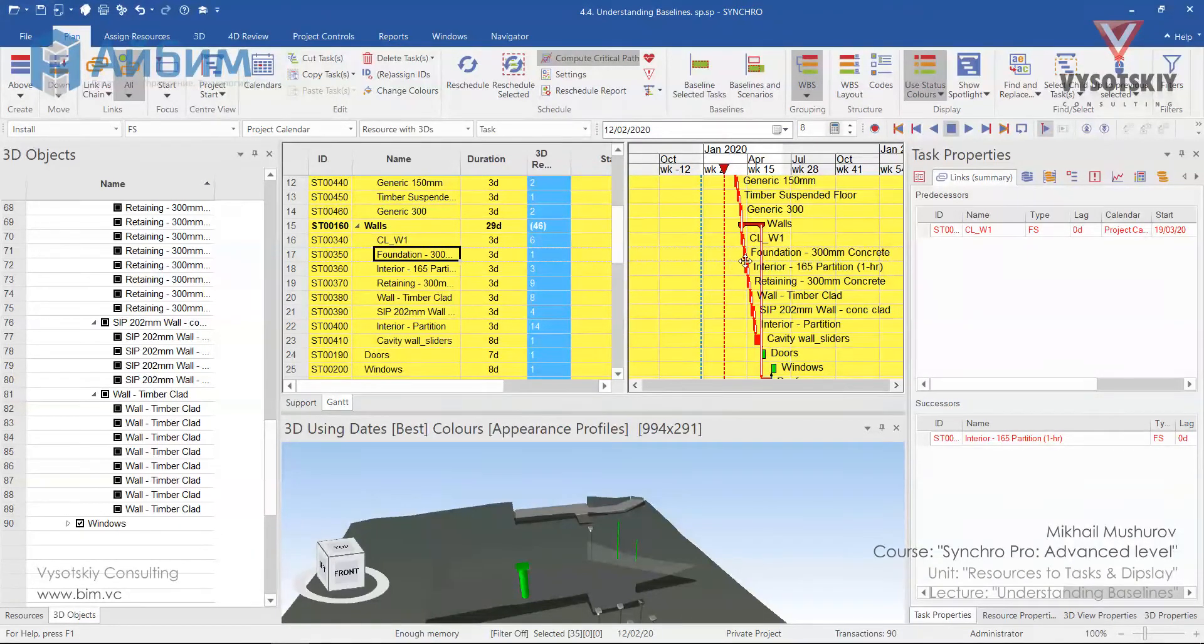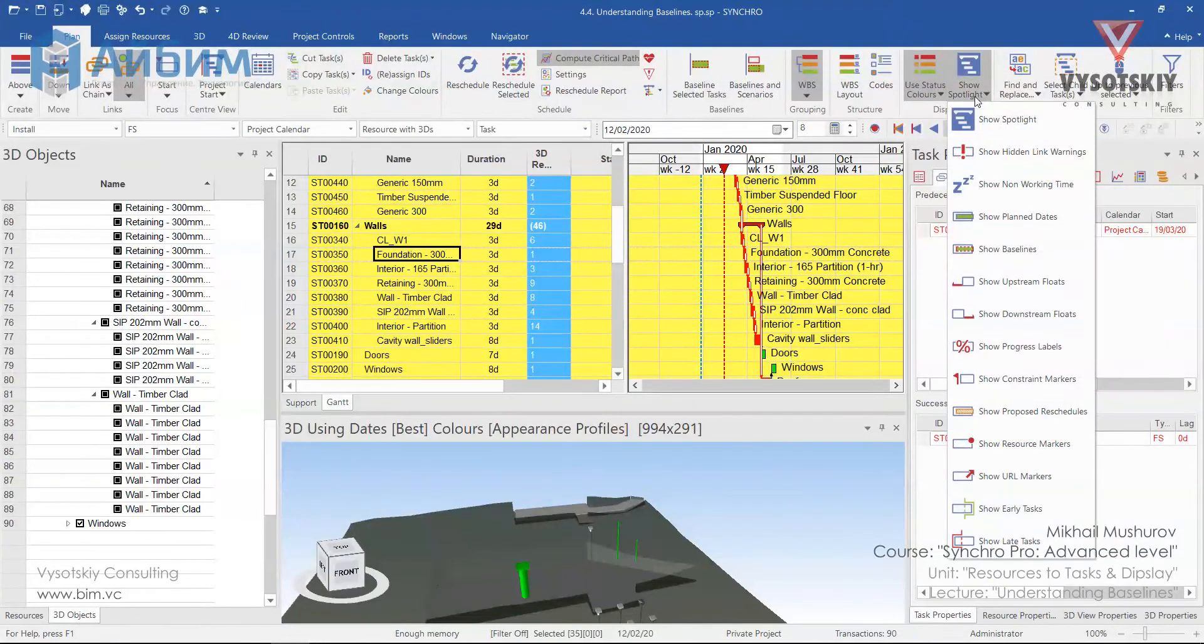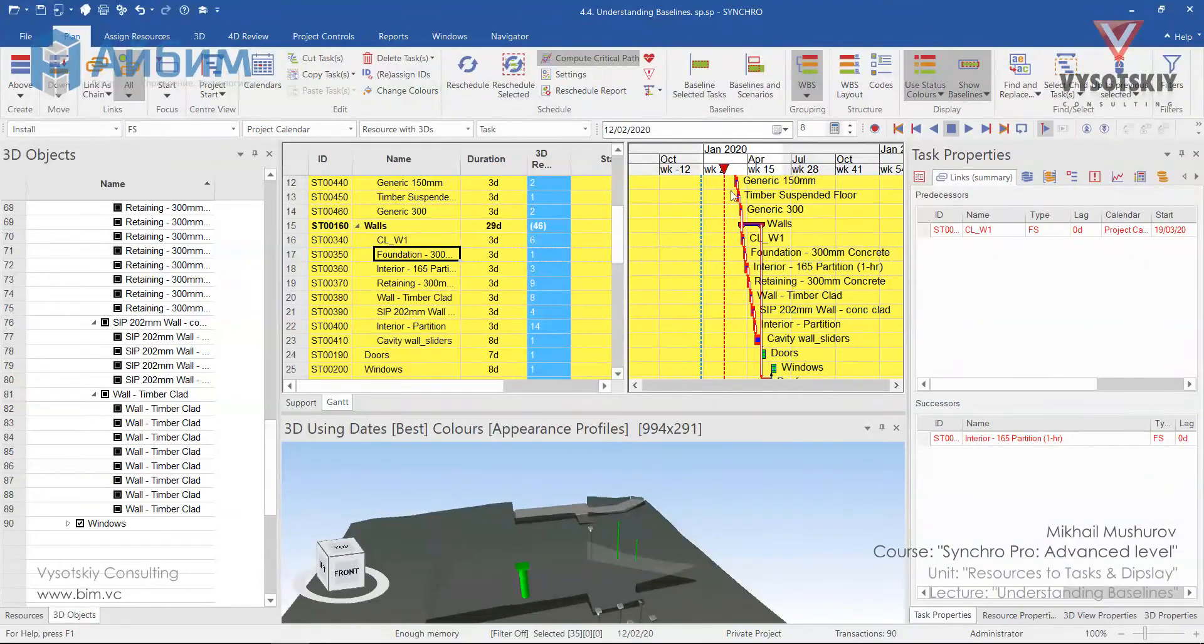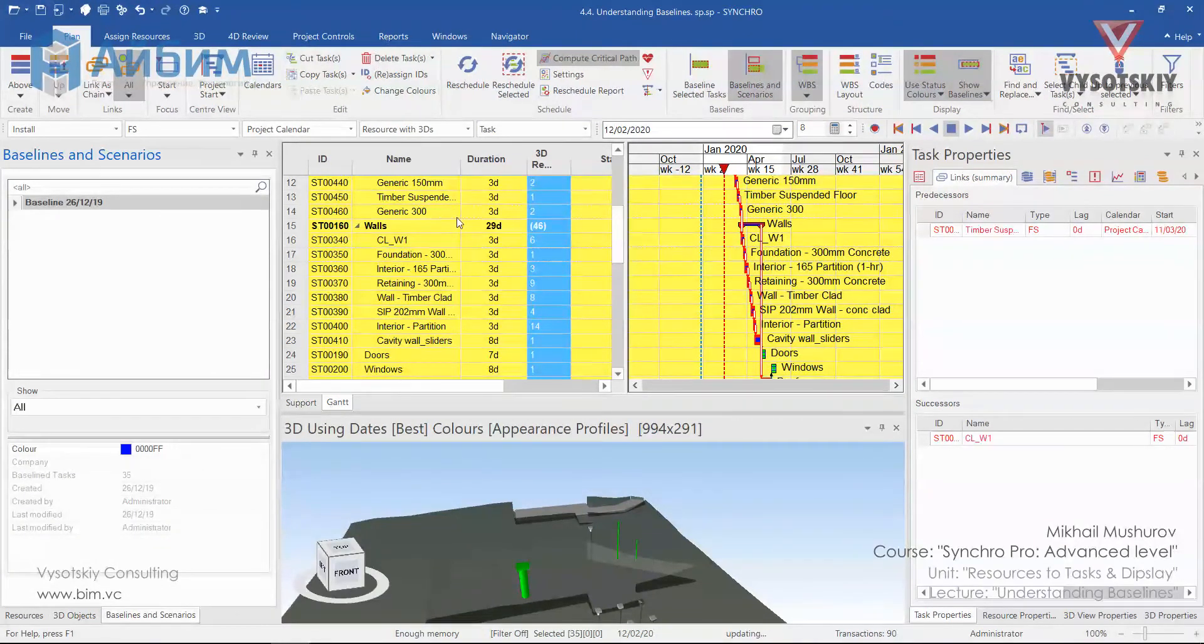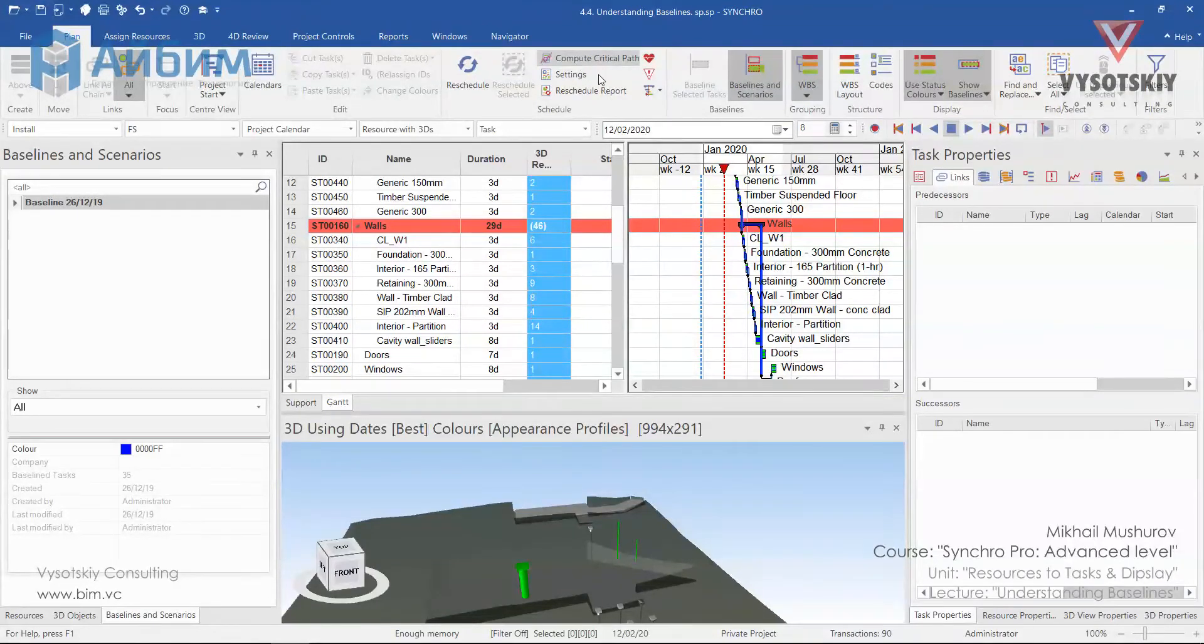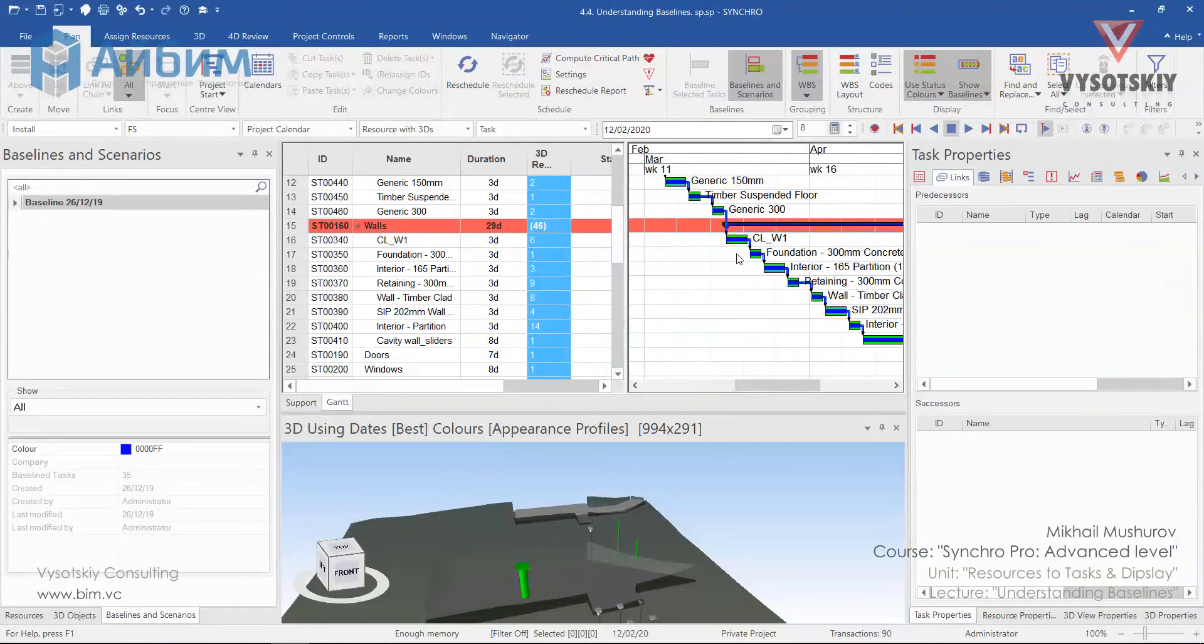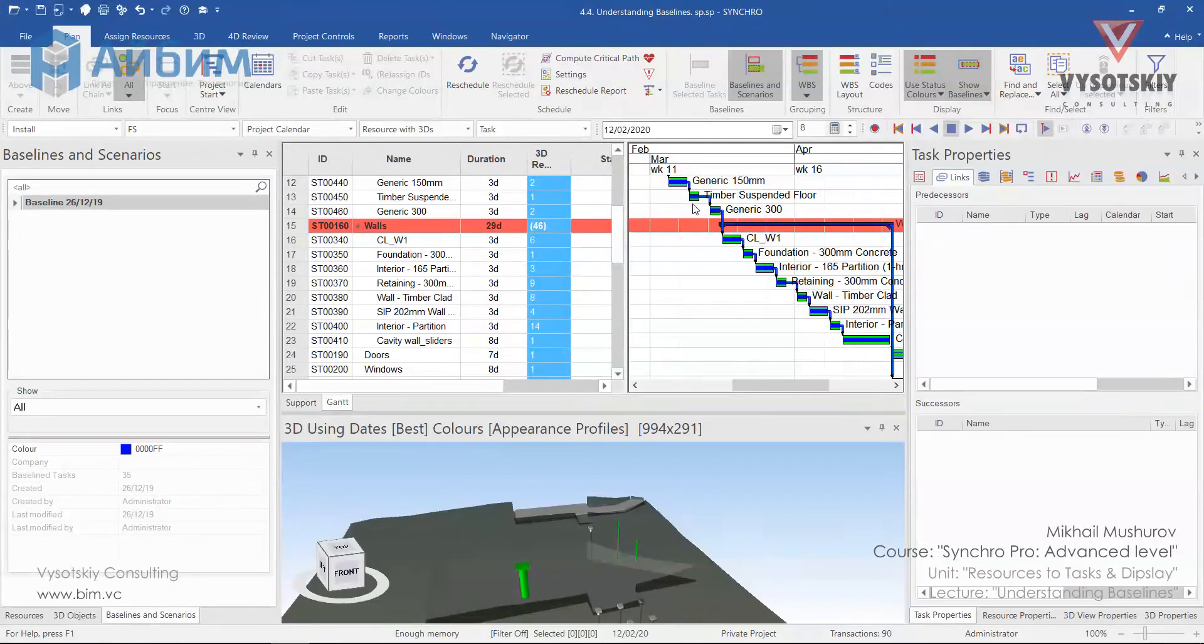Now in order to display our baselines, go to display tab, open the drop-down and select show baselines. Also let's open the baselines and scenarios. Let's turn off compute critical path and zoom in. So now it looks simple. So the green bar is our reference bar and the blue bar is our baseline schedule.